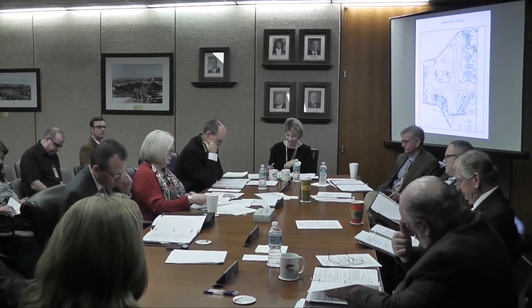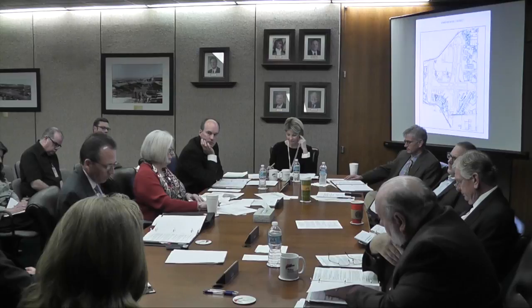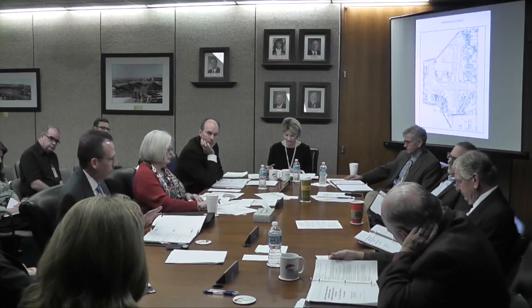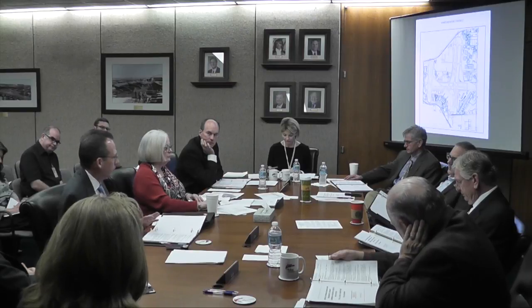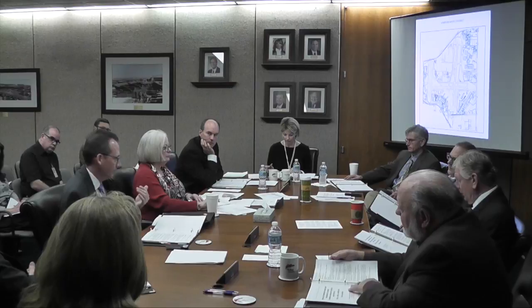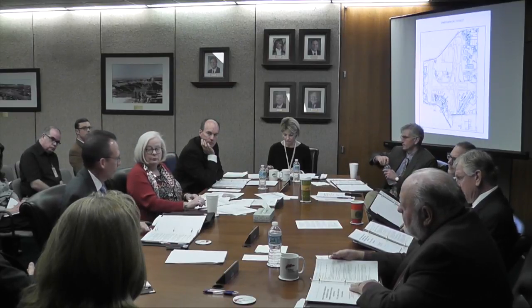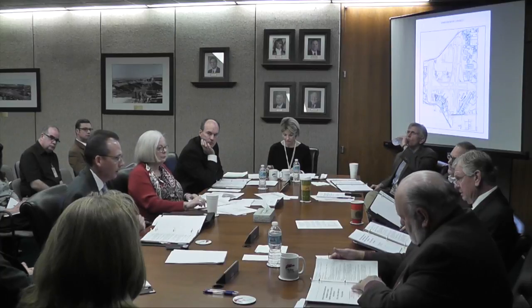Item 3B2 is to acknowledge receipt of bid, and this is for the building roof repair project with Southeast Tulsa Construction, the amount of $951,860.34. And this is just acknowledging receipt. You're not taking action on it. We have to take action to at least acknowledge the receipt. That gives us another like 30 days or so to your next meeting before we have to either award or reject.